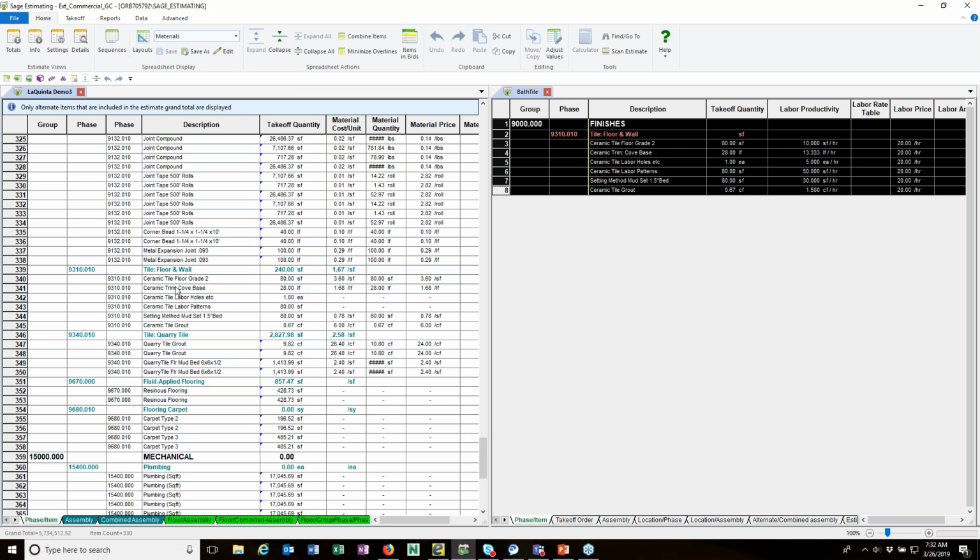I can move within an estimate to a different sort level, and the item levels change. I can copy within an existing estimate to a different sort level. I can copy between estimates, like I showed you here. And the new items in the destination estimate have the same or different levels as the source. What I cannot do is move items or assemblies from one estimate to another.